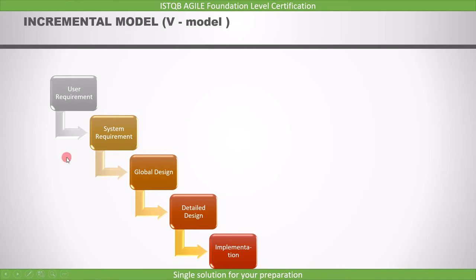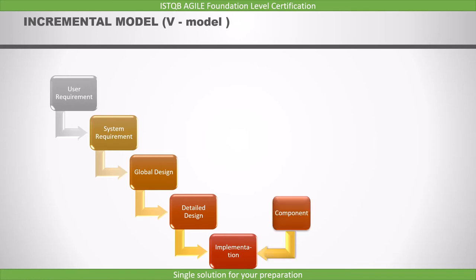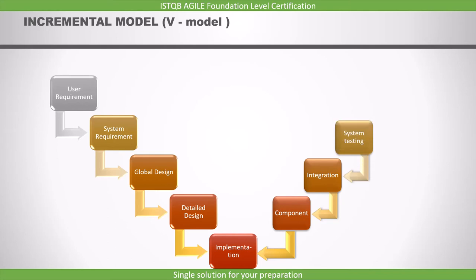These are the steps in this development activity: you get the user requirement, create the system requirement, then develop the global and detailed design, and finally you implement the code. Once the implementation is over, the software is ready. Then we perform component testing on it. Once that is done, we perform integration testing. After integration, we will do system testing. And finally, the acceptance testing.